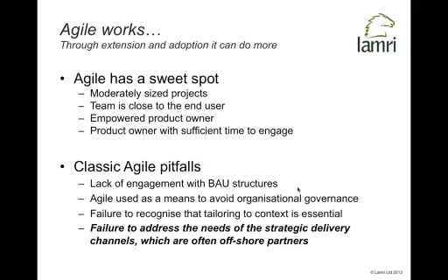The massive power of Agile is running iterations, with demonstrable software at the end of each iteration that actually delivers value to the customer, and then feedback and a mid-course correction opportunity at the end of each iteration, as we inevitably misunderstand things. We get it fixed and move in the direction the users actually intend us to go.